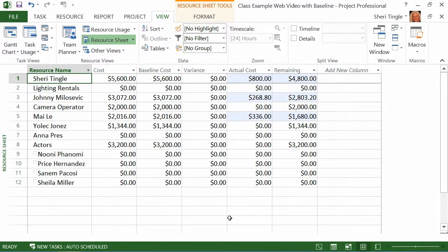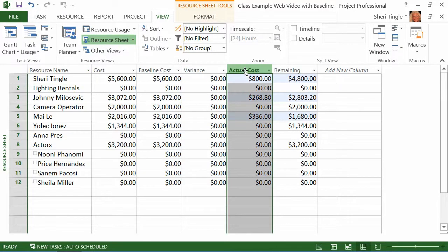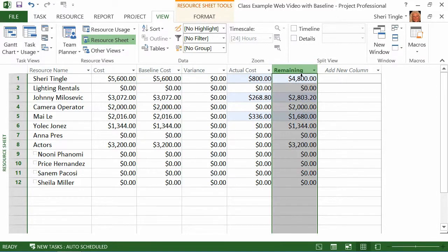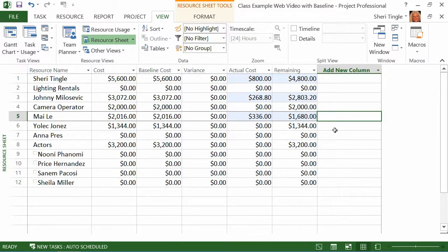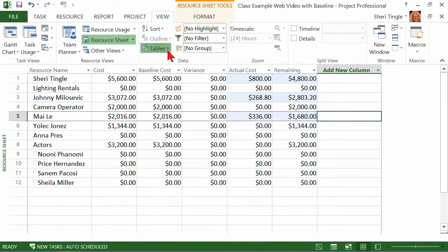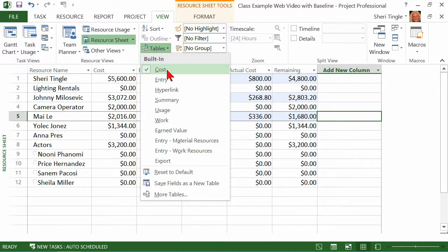It says, okay, well, so far Sherry has cost you $800, but she's scheduled to cost you $5,600 for this project. So you're still going to spend another $4,800 on Sherry and the others as well. So you've already spent money on Mye, and you've already spent money on Johnny. The other people, any of the other people that are assigned to this project, they haven't spent any money yet. They're not highlighted. Isn't that fantastic?